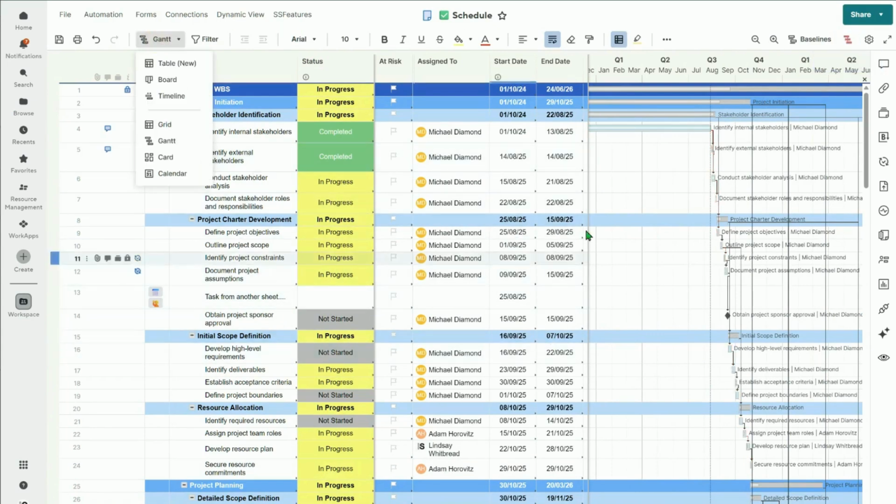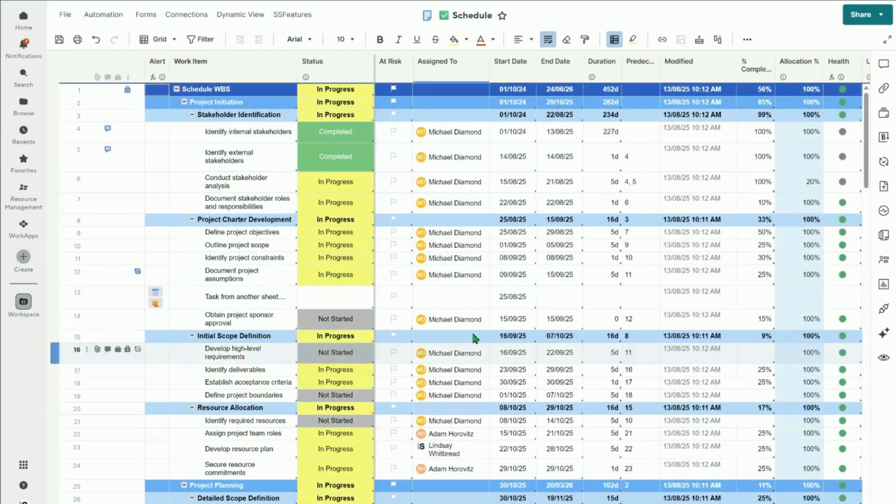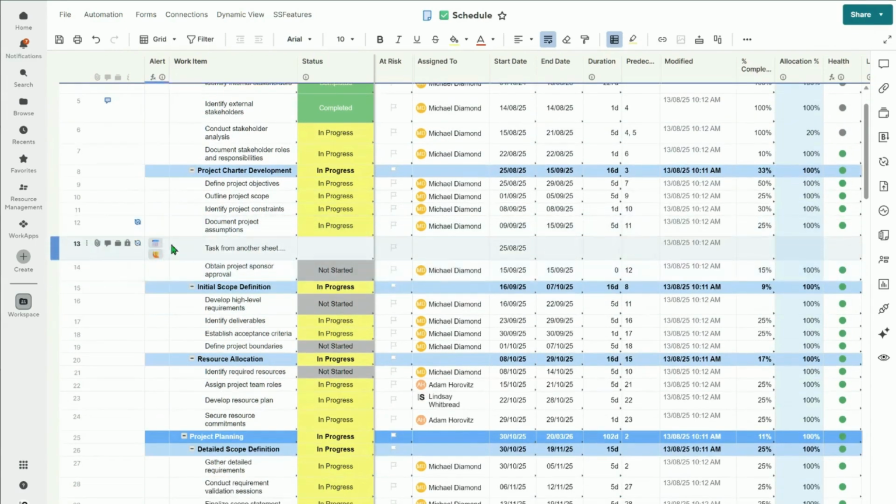And when you're wanting to look more at this data, you can turn that Gantt view off and just move to a grid view. And what you can see is there's some indicators here, and that just lets you know that there's something wrong with this row. There's a helpful little guide here to let you know which symbol means what. So in this case, we've got the schedule for this task is missing and there's no one assigned to the work. And sure enough, you can see that there is some information missing here.